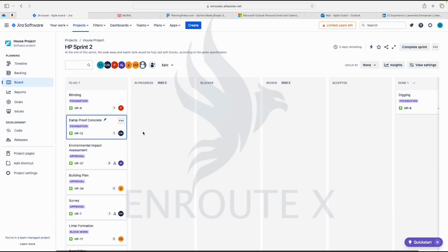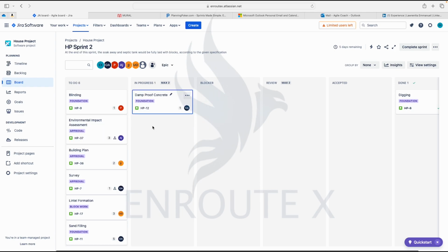Mind you, in Module 2, I laid emphasis on why the developers must update their workflow. That brings transparency to everybody. So where we see that day 1, day 2 of the sprint, nothing is in progress. In actual sense, this story carries 1 point. On day 1, the story should move here.